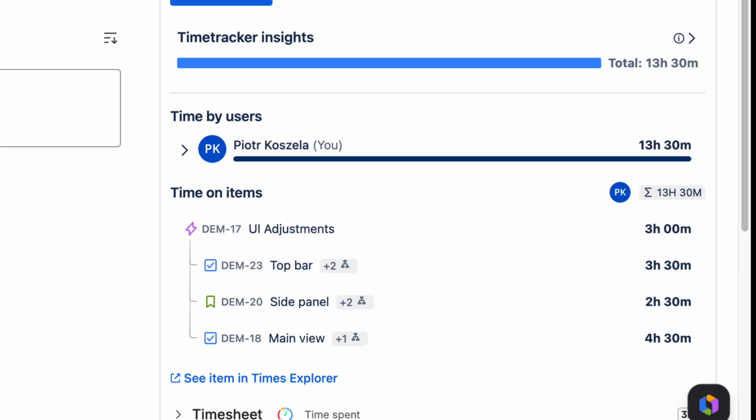When work is logged on deeper levels of the hierarchy, 7-Pace indicates this with an information icon. The number next to this icon shows the number of tasks at lower levels that contribute to the total hours. While the tree view focuses on the immediate sublevel to maintain clarity, all time from subsequent layers is automatically rolled up into the parent's total.